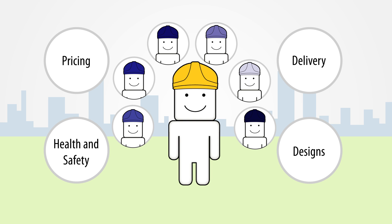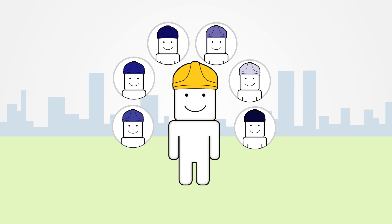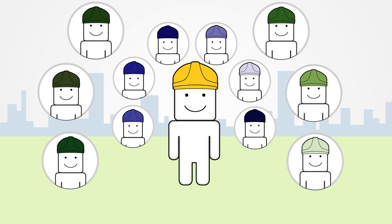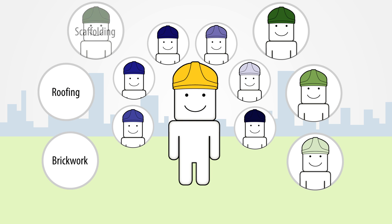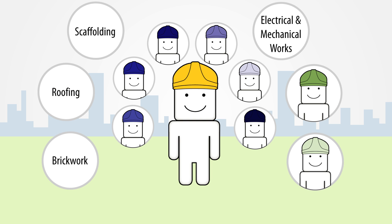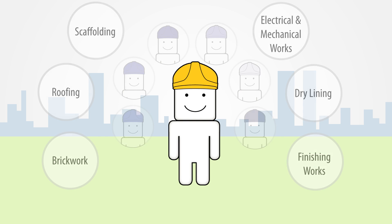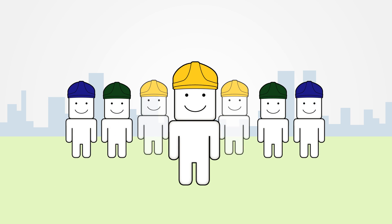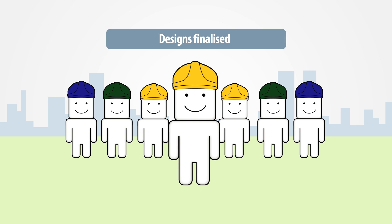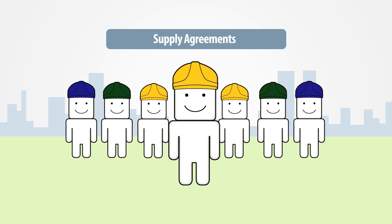The designs are returned to the main contractor for refinement and the tier 2 firms begin selecting the tier 3 contractors, responsible for brickwork, roofing, scaffolding, electrical and mechanical works, dry lining, and finishing works. The designs are finalized by the main contractor and supply agreements are drafted up between all builders' merchants and manufacturers.